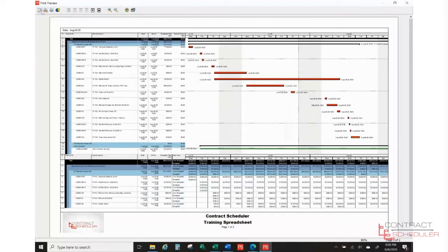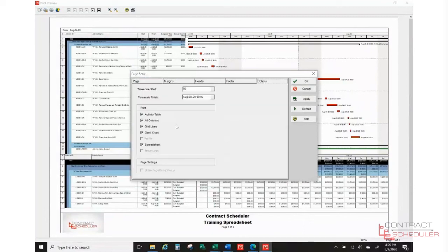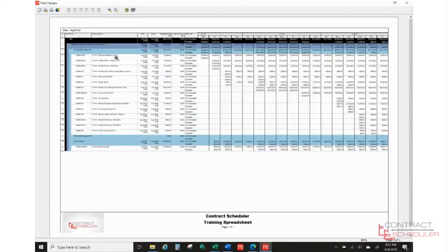So it's really, think about what your client or the project team, what they need to see, and then do your reports accordingly. But so if they just want to see, in this case, for each activity, and then how much was budgeted, and then over time, in this case, it goes by day. See, it's per day. I can see what the budget amount per day is, and then the cumulative, the total until the activity is complete, and then the budgeted and the cumulative total should be the same.